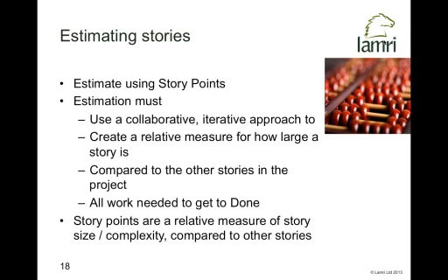The idea with the approach is that we recognize it's very easy to be influenced adversely by other team members. So each person will have a discussion about a particular story, get a consistent understanding of that story, then each person will place a card face down, which is their estimate. Often we'll then turn them all over together, and the person who put the largest estimate and the smallest estimate will get a soapbox, an opportunity to say, this is why I believe it's this size, or these are the facts that I believe, and then we draw again. The idea is to get to convergence, some sort of converged estimate that everyone can buy into on that particular story.